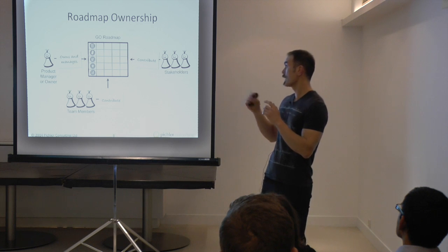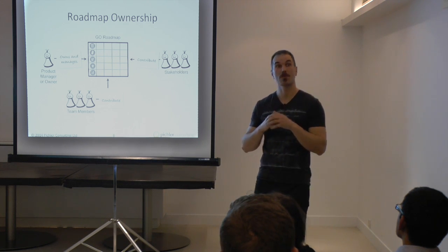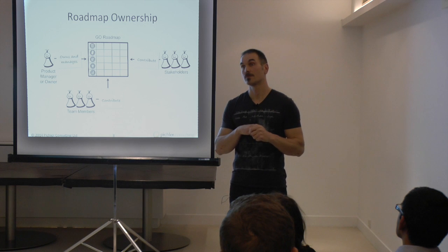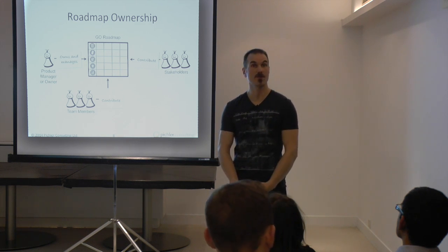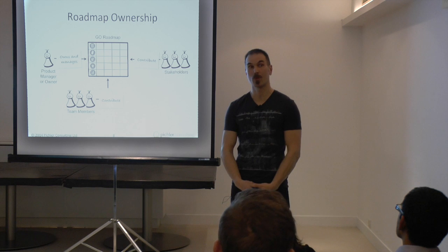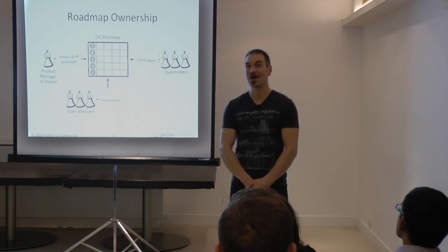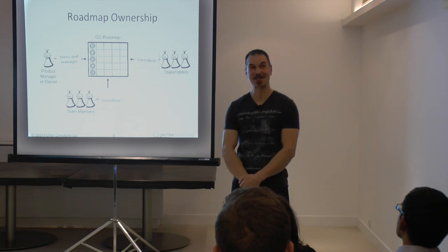A great way to create a roadmap, certainly an agile roadmap, is to have a little workshop. 2 to 4 hours should be enough if you've got the right input, if you've done a little bit of prep work, and for instance, you know which market segments you're targeting.